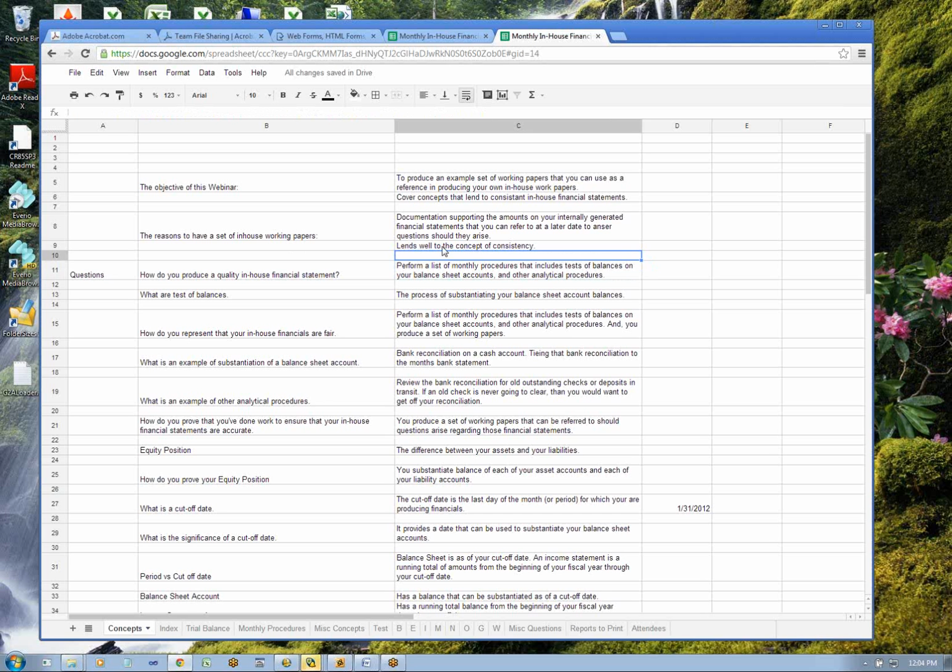Also, there's a concept called being conservative on your financial statements. And a conservative financial statement means that you're really going to understate them a little bit, so that, like on your projects, and we'll go through your over-under billings on your projects. If you think you're going to make 10%, maybe put them at 8%. Or if you think you're going to make 30%, put them at 25%.